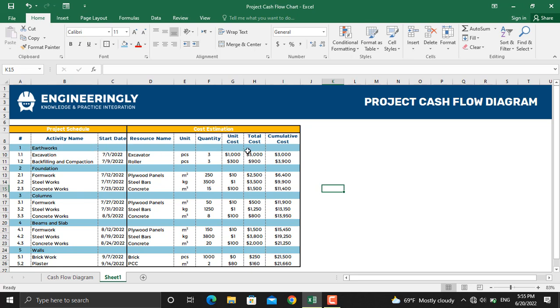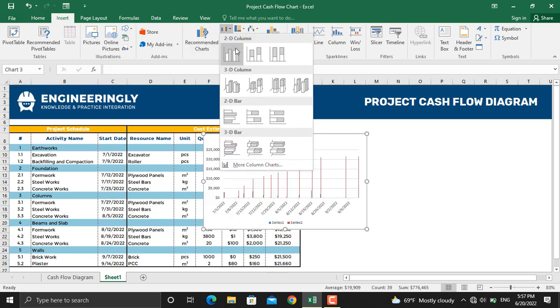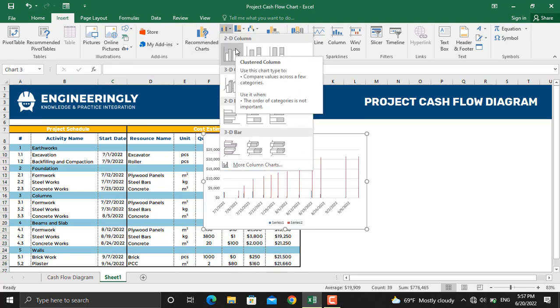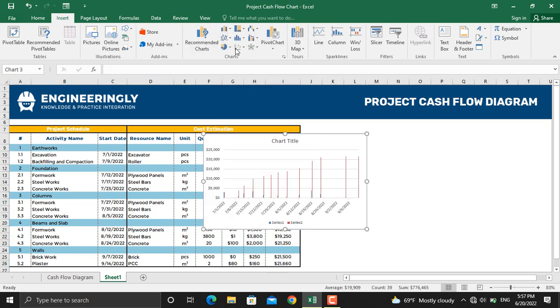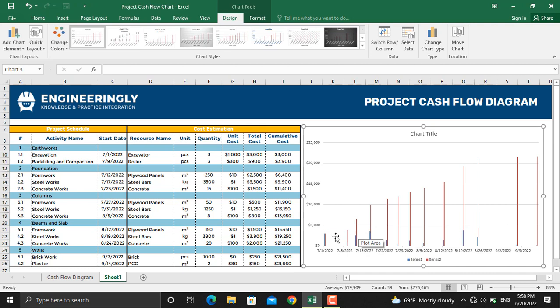So for that one you will need to select the dates, the total cost, and the cumulative cost. Once all the dates, the total cost, and the cumulative cost are selected, I'll go to Insert and from here I will select a 2D column chart. In this chart as you can see, both the total cost and cumulative cost are represented on the same vertical axis.